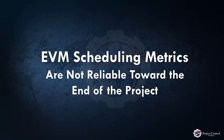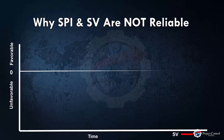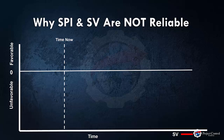Another issue with the EVM scheduling metrics is that they fail toward the end of the project. The schedule indicators initially appear to establish a trend at the beginning of the project, but at some point around two-thirds into the project, SPI and schedule variance begin to become really meaningless. Here is an example of the same project I showed you earlier, which is behind schedule. We want to evaluate what's going to happen at the end of this project — let's assume it is completed late according to what we see right now.